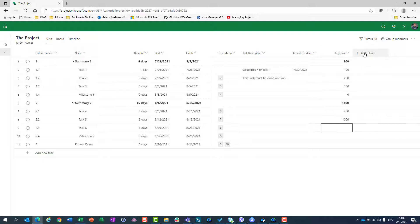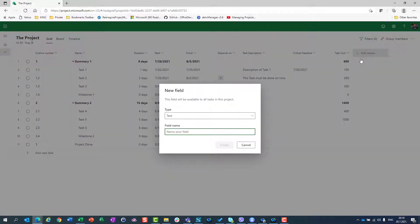Now, let's say I want to know if some task should be reviewed by the Project Manager before it is considered done. The resources are going to work on that task, but we need to be 100% sure that someone approves it. So some tasks should be approved by Project Manager and some not. I'm going to create a new field.